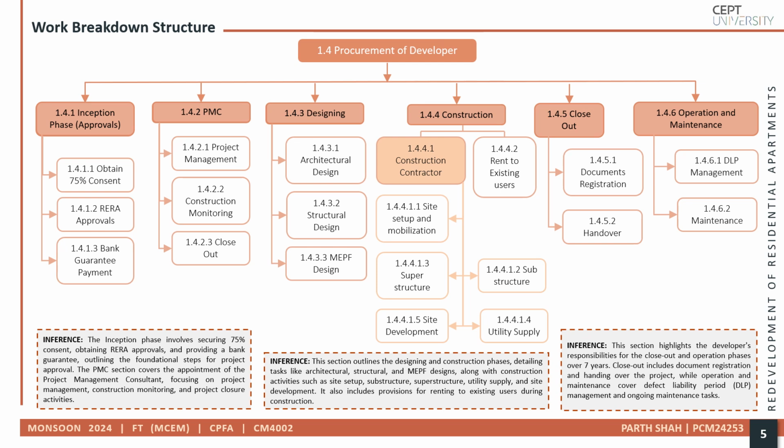The closeout and operation and maintenance phase highlights the developer's responsibilities. Closeout includes document registration and handing over the project, while operation and maintenance covers the defect liability period and ongoing maintenance tasks for 7 years.